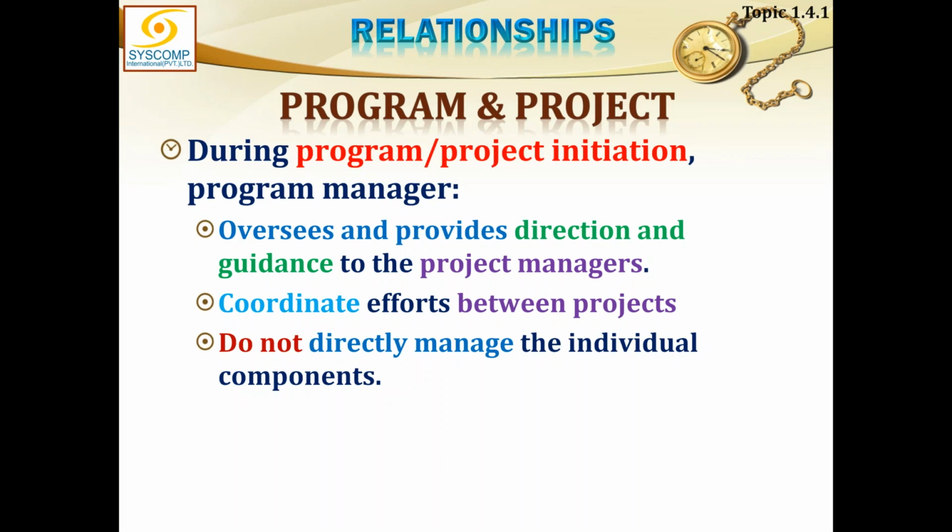Whatever the life cycle of the project is, you will be involved in initiation and closure of every phase and the project itself. You will be approving whatever they create, the documents, the project management plan, and everything. But do not create the project management plan. Do not try to interfere in the creation of those documents.